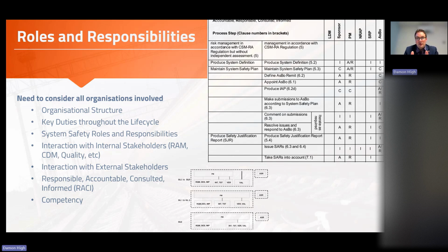And what that's also demonstrating is, depending on the safety critical nature of the project for the delivery of a software intensive safety critical subsystem, there are certain rules that, depending on the safety integrity level that software for that system needs to meet, have certain requirements that must be met in terms of making sure that we separate the roles of verifier, validator, and making sure that the independent assessor is also kept away from the project delivery team as well.